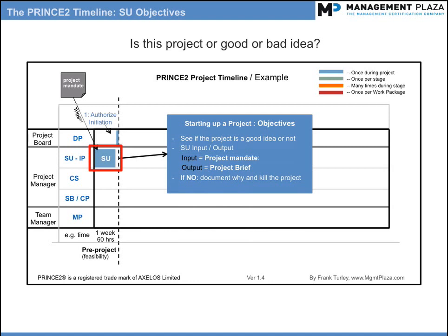the project brief. Now, you may be thinking, why bother to document a bad idea? Well, someone may have a similar idea again in 12 months, so it will be good to see if anything has changed. For example, perhaps the technology has now moved on, or market conditions have improved. Last comment. Companies that have a mature attitude towards project management will provide a budget to consider ideas for projects and see this as a good investment to detect both high-level ideas and low-level ideas.